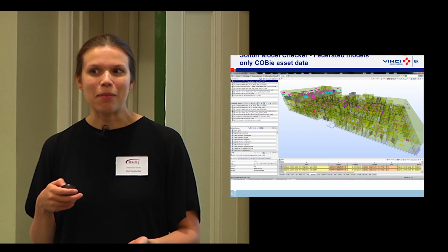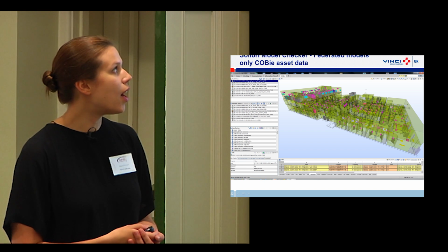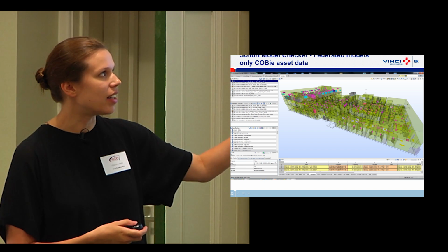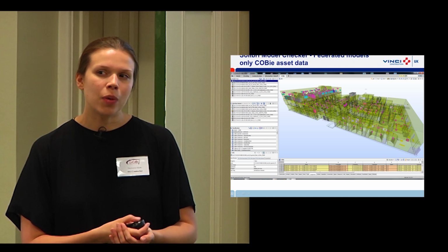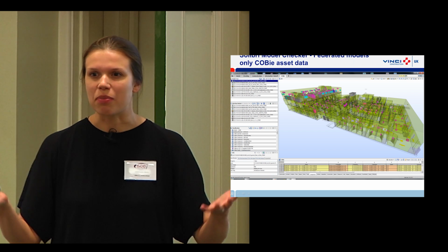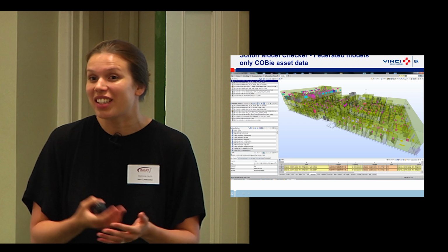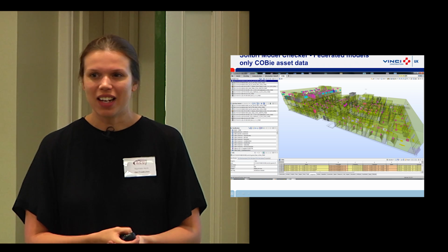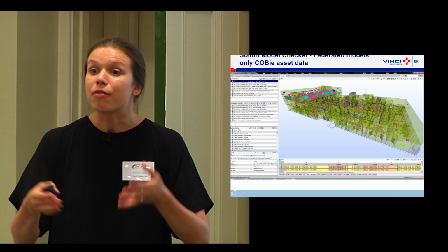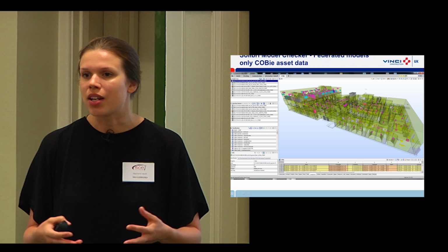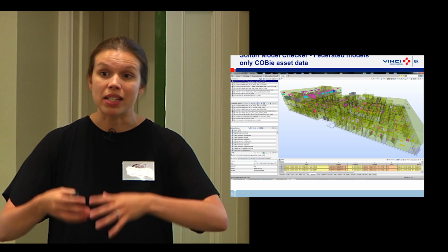I just thought I'd show you a little example of what a BIM model looks like. So this is a project we're just handing over at the moment. And this snapshot shows you what we're actually handing over. So one thing to consider, this BIM thing sounds like it will make you quite nervous potentially, because you've got to add all this information into models. But what we do with clients is make sure that they are asking for the right information and for the right assets. So a client doesn't need to know lots of detail about an asset they're not going to maintain, because it's meaningless data. It makes the model really big.